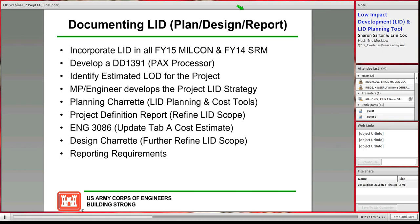As the project goes forward through the project definition report and DD Form 3086, you can further refine which BMPs will be used, their sizing, and cost. We want to make sure BMPs are included, get funded, and that you're doing what you need to comply with EISA. You'll continue through the design charrette to work on BMP details. Once the project is complete, installations will be required to report on meeting EISA and which BMPs were selected.